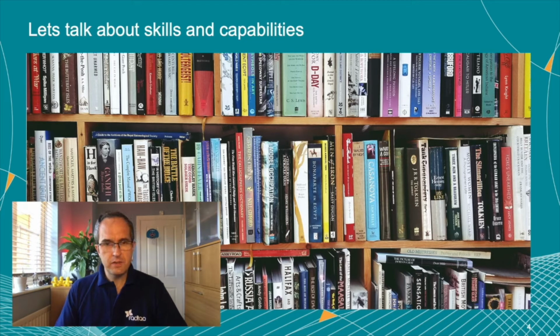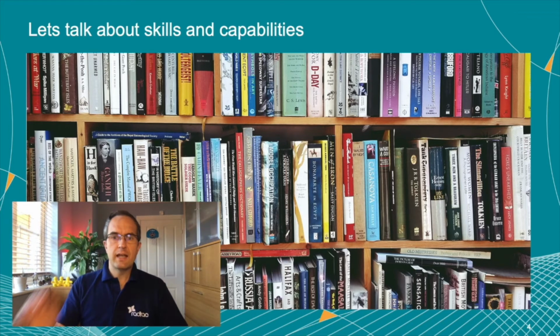More specifically for the system team PO, these additional skills are also important. Value stream mapping capabilities, critical to understanding the current development value stream and create a future state. This allows an improvement roadmap to be created that will seed the work the team can do to support the flow optimization of the ARTs. Technical understanding of the continuous integration and continuous delivery DevOps pipelines, supporting technologies and the tool chain to implement it. This is the product domain for this product owner.